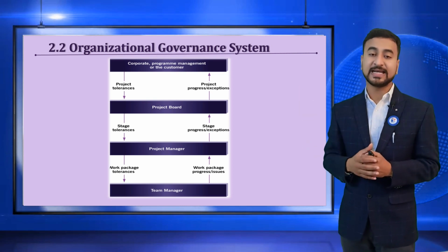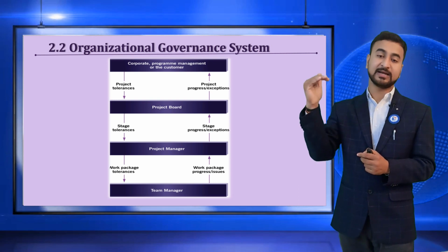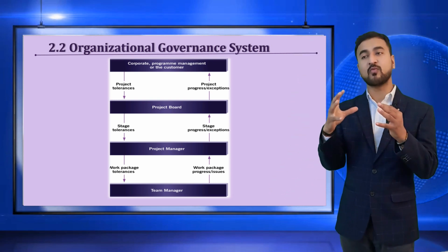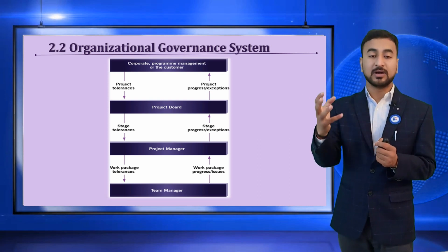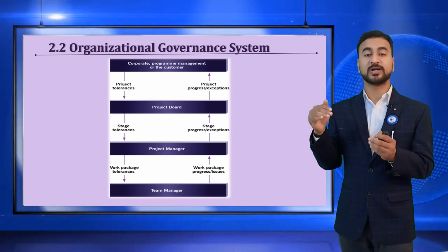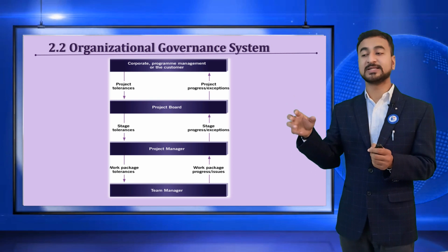One technique is what we call delegation, or setting a threshold limit at the team manager, project, program, and governance levels. How does it help? The governance body does not need to get involved in small trivial things. They save their time and simultaneously they have the control.